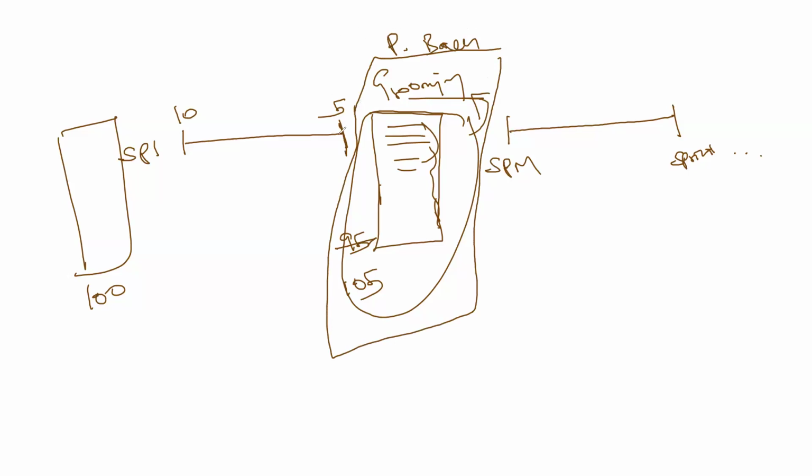After completing a sprint, we do something called product backlog grooming, and based on that, we will have an updated product backlog. That updated product backlog becomes the input for next sprint's sprint planning meeting. Is that clear to you?